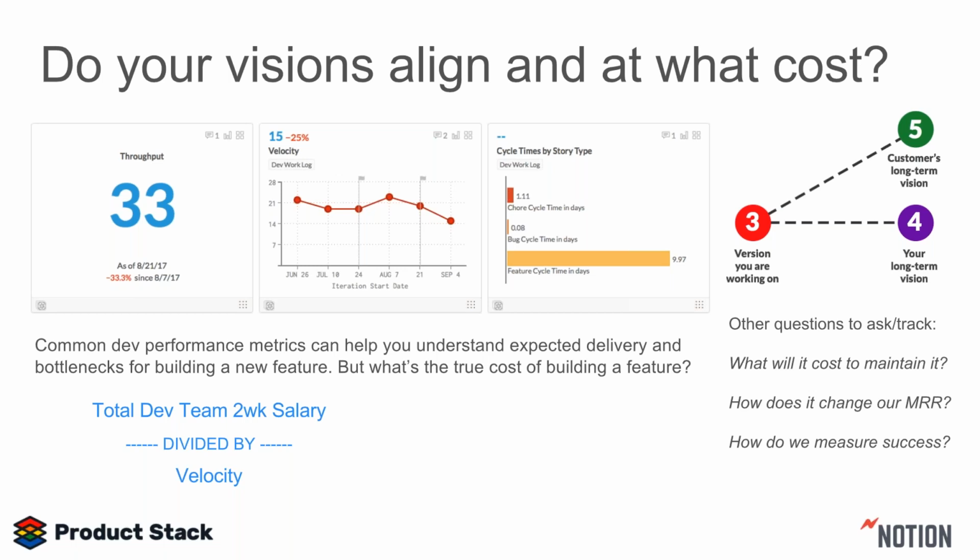So you have your standard dev performance metrics that you should be tracking, things like throughput, velocity, cycle times, right? These things help you identify bottlenecks within your workflow, and will give you the ability to better understand expected delivery. So when it's your job to communicate features out, if a feature request comes in and everyone on the sales team is hot on this idea and pushing on you to build it, you can come back to them with these metrics and say, well, look, this type of feature, it's 10 points, right?